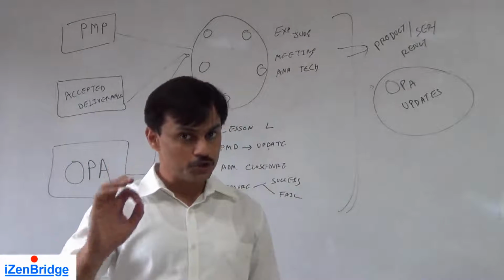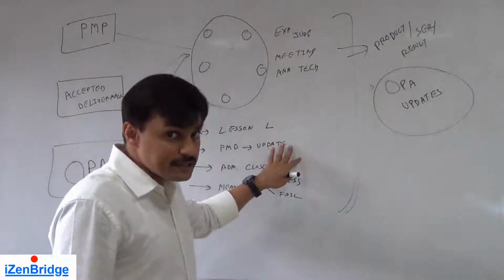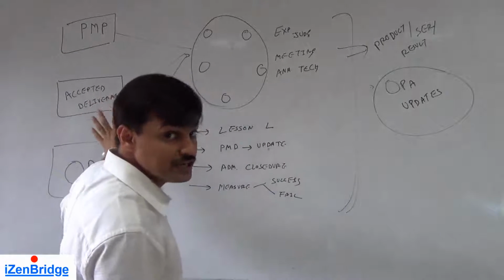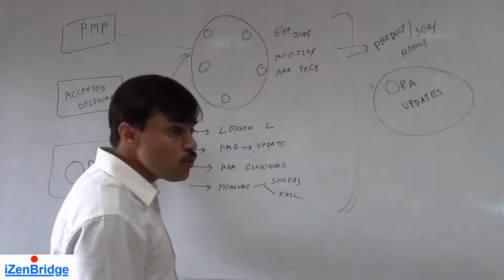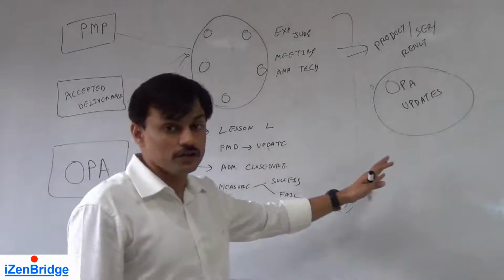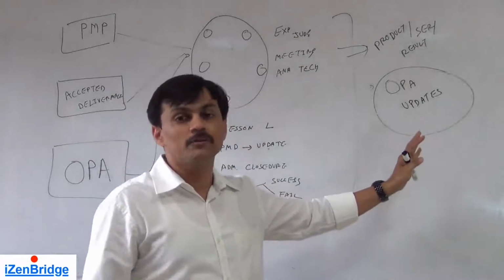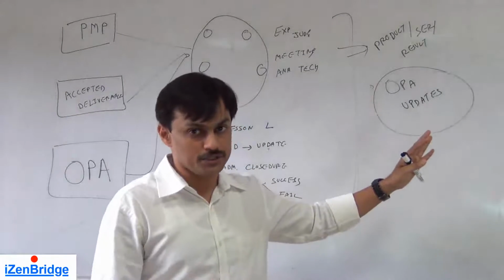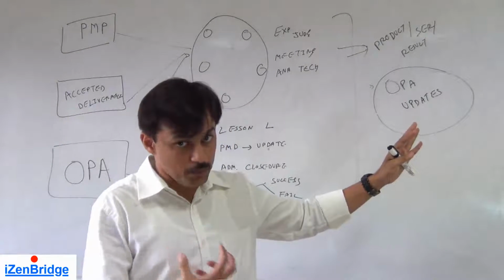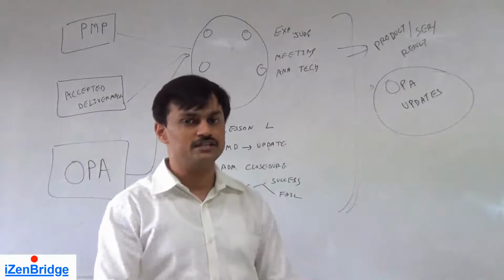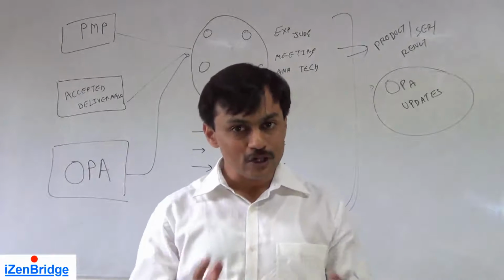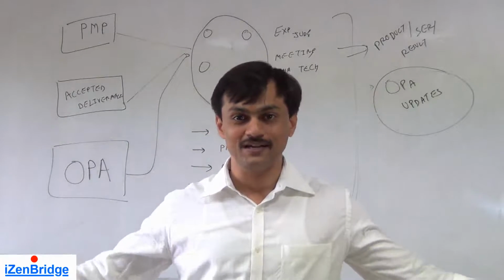Second thing you need to remember: you get acceptance of deliverables using the validate scope process. So you take accepted deliverables as an input. It's not that only after you close the project the deliverable goes to the end customer or end user. You have been taking acceptance, performing validation, in between, but now you say that everything is done and we want to do a closure of this particular project. And this also closes the project integration management knowledge area.